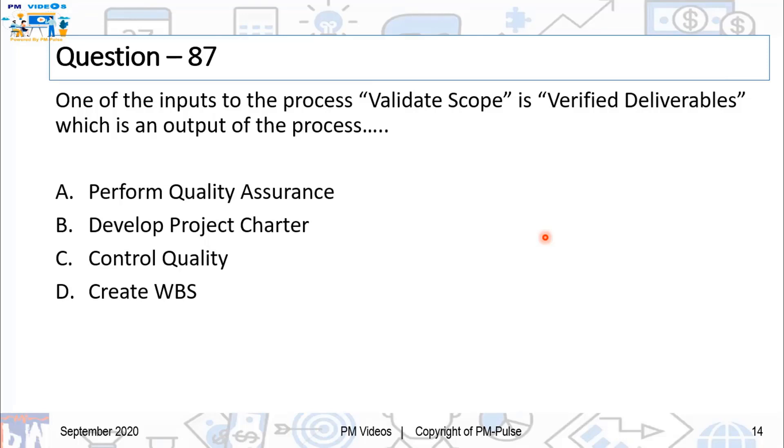One of the inputs to the process validate scope is verified deliverables, which is an output of the process.